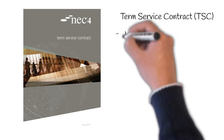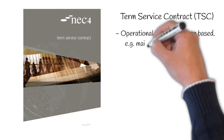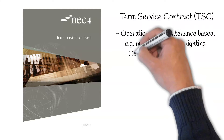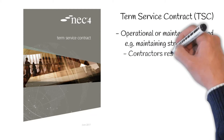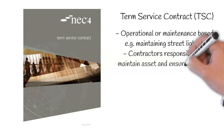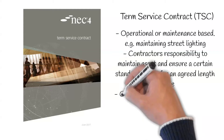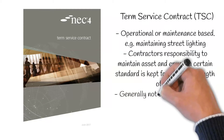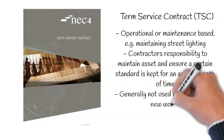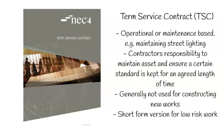Term Service Contract, or TSC. This is for a project which is operational or maintenance-based. For example, maintaining a highway asset like street lighting. It will be the contractor's responsibility to maintain the asset and ensure a certain standard is kept for an agreed length of time. This contract isn't generally used for constructing new works. There's also a short-form version of this contract for low-risk work.